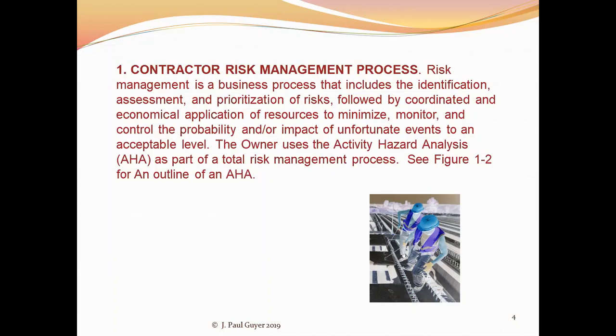And then once you've prioritized the risks of these different incidents that you have identified, you then allocate your resources to preventing them. Now, some of the resources may be the provision of appropriate personal safety equipment.